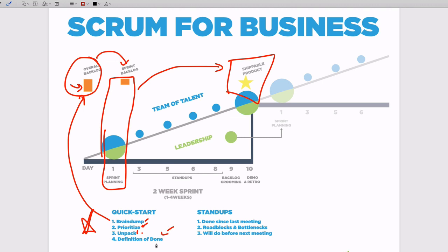In the case of the speaking agency, the definition of done is something like: our speaker shows up at stage, all the AV that they need is there on the side stage on a little table, they can walk up, not have to think about it before that moment, and 10 minutes before they go on stage, get hooked up with their lav mic, the clicker gets put in their hand, the slides are already all loaded up, and the speaker can just stroll on stage, right? Something like that.